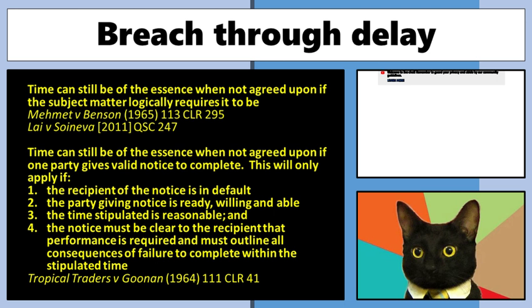So just make note that if the other side in a contract does appear to be tardy or slow in situations where you haven't specified a time, and you haven't made time of the essence, you can give clear, unequivocal notice that you wish, even though this is after formation, to make time of the essence.